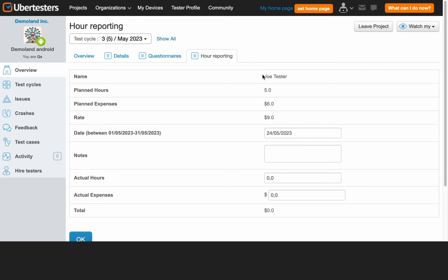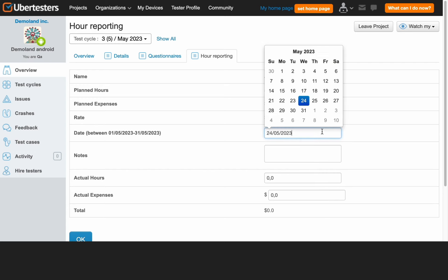Firstly, check to verify the reported information – your name, planned hours, planned expenses, if any, and hourly rate. Secondly, enter the date of your work. Ensure that the date falls within the project's timeline, which is conveniently highlighted in blue.